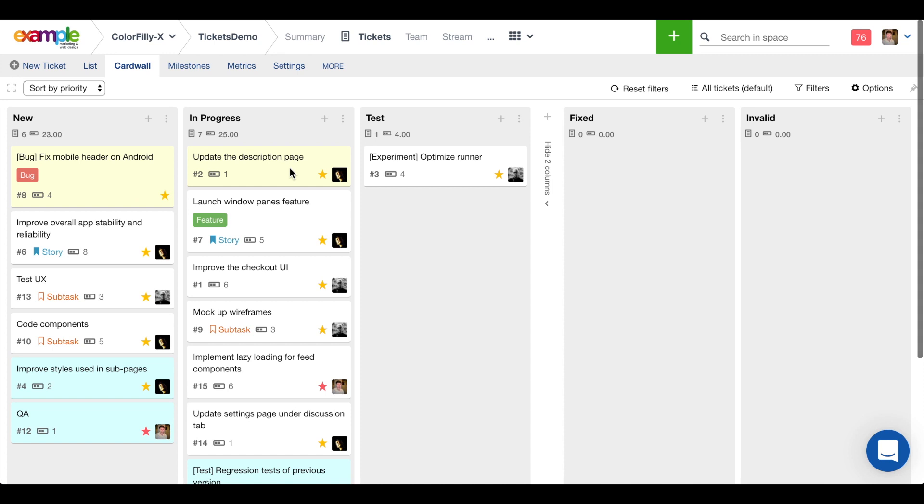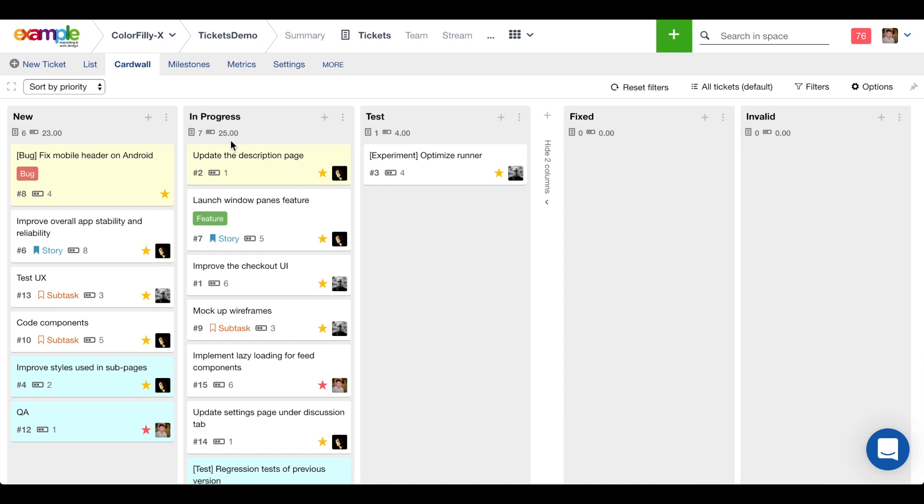We've got a lot of story points collected up here in progress, and there's some tasks that haven't even been started. We've got about 23 story points in the new status that haven't even been started by our team.